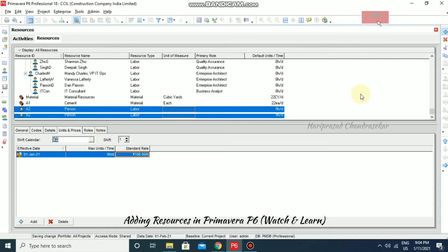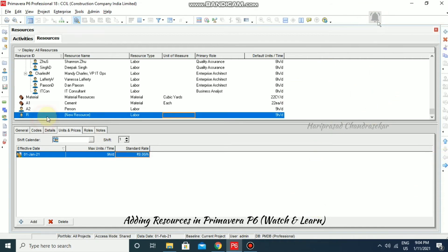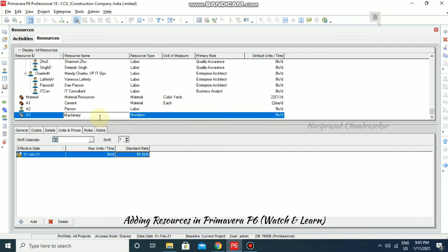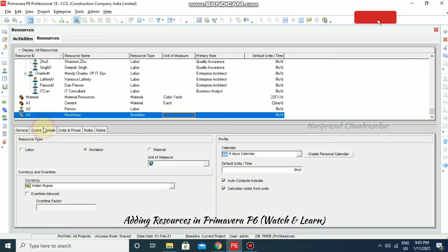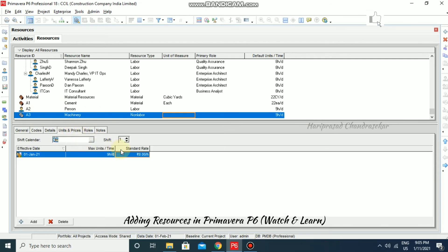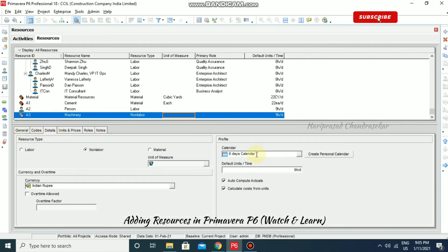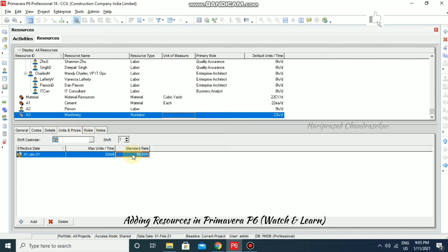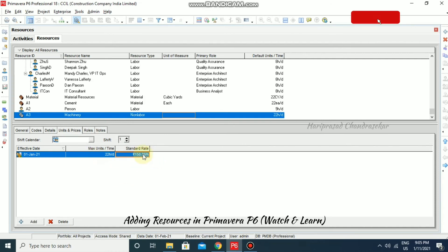I'm going for a new resource A3 and selecting Non-Labor, and I'm putting 'Machinery'. Machinery is non-labor and the icon changes to the non-labor type. For non-labor, sometimes overtime applies — we can set units and prices. For the calendar we can go for a 7-days 24-hour calendar. The standard rate is 150 per hour, so if some machinery costs 150 rupees per hour, you can set it here.